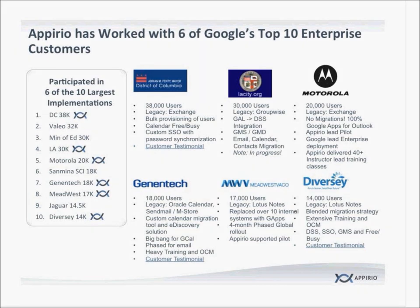Motorola was very heavy on communications, training, and support — we delivered a lot of training for these folks. What was unique about Motorola has to do with their content migration strategy: rather than moving everybody's content for them — what we call server-side migration, using tools like GAMI (Google Apps Migrator for Microsoft Exchange) or Gamelin for Lotus Notes — Motorola took a different approach where users primarily self-served migration. In these larger deployments we typically see more server-side or project-team-executed migrations than was the case with Motorola.